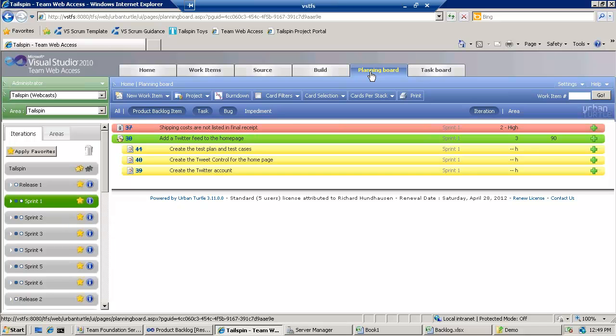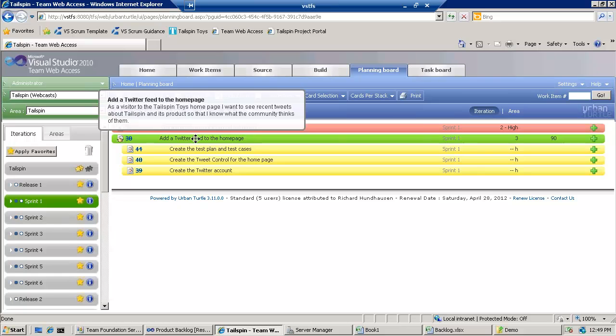And that's good because, hey, as a team, you might finish early. Our 2-week sprint here, we maybe finished this bug fix and added that Twitter thing, and we're done after 6 days. So what do you do at that point? You go to the product owner and say, hey, we need more work, and we know what's in the backlog because we've been looking at it regularly. So we're probably not able to get the next number 1 thing done, but number 2, if I remember right, was fixing some reports, and we can easily get that done. So you can pull that work out in priority order and continue to make the product owner happy.